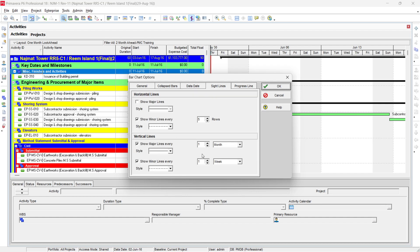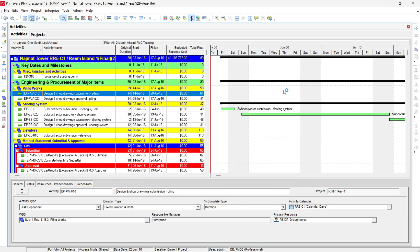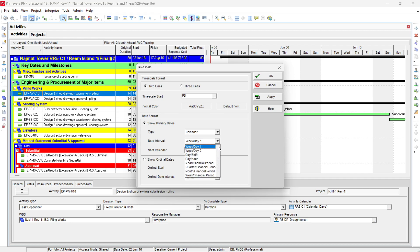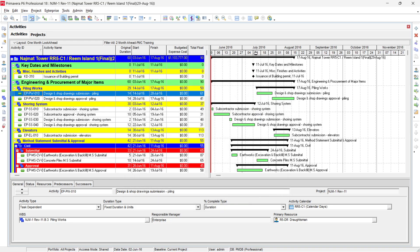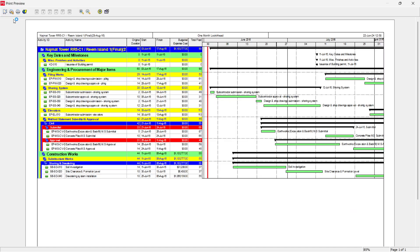Set sight lines to week and month accordingly. Then go to Time Scale and select month and week. Now the Gantt chart displays based on month and week. In this view you cannot see individual working days or holidays, so it is advisable to at least show Sundays so that anyone reading the program can make evaluations and comments. The site team and planning team can then fully understand the program without confusion.